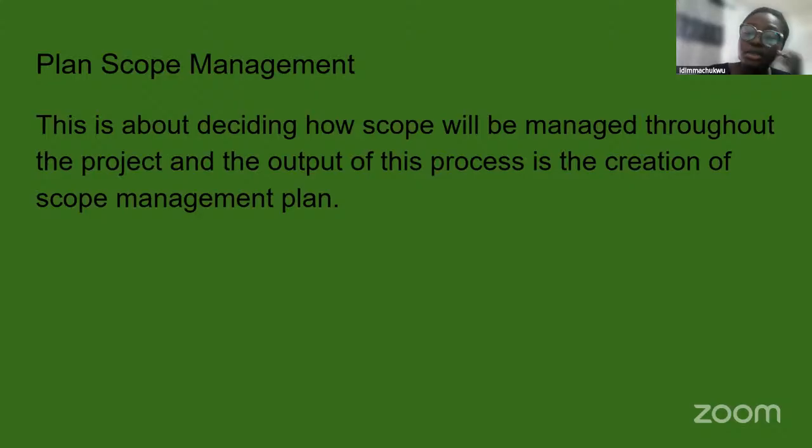The project manager will then do what is known as impact analysis to understand how these requirements will be affecting that project. These requirements we are about to add now, how is it going to affect the schedule? How is it going to affect the budget? Or what are the risks that follow these requirements? What are the risks we are going to have to deal with if we decide to agree to these requirements now? After that, the project manager will submit his or her analysis to what is known as the change control board.